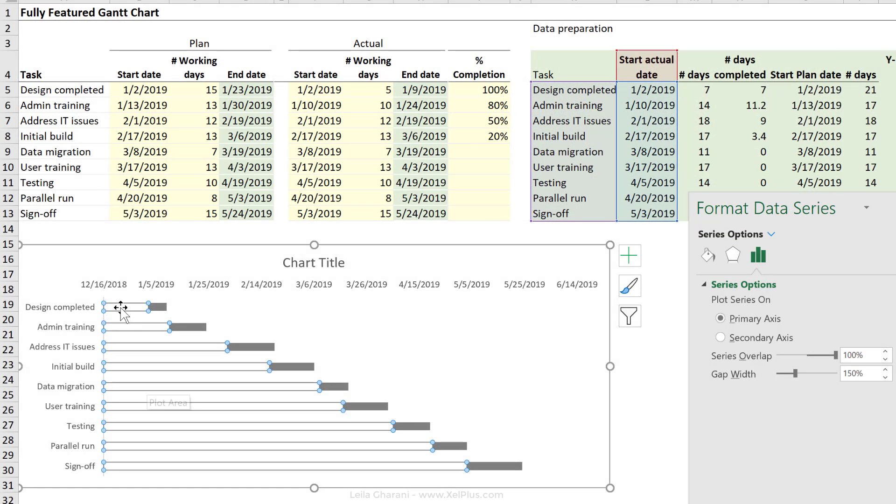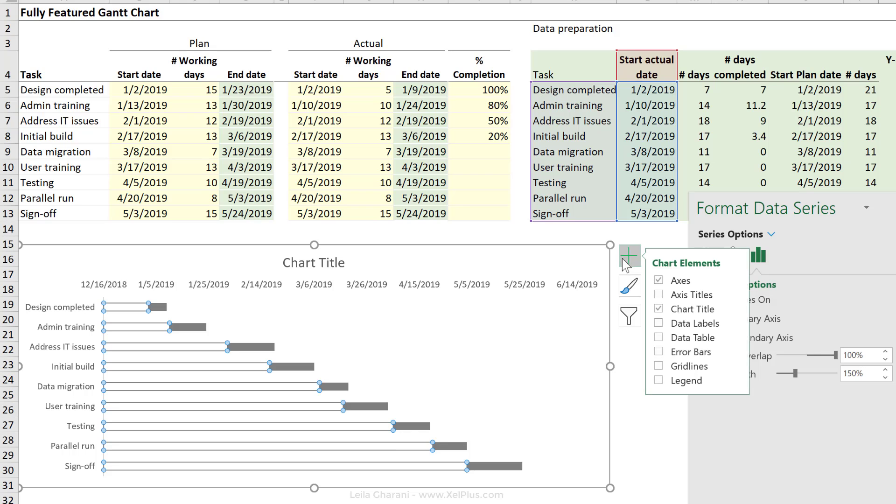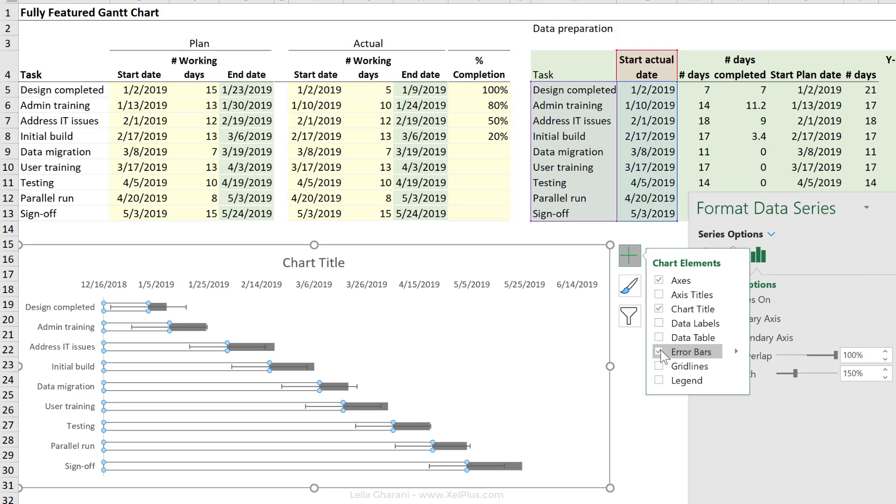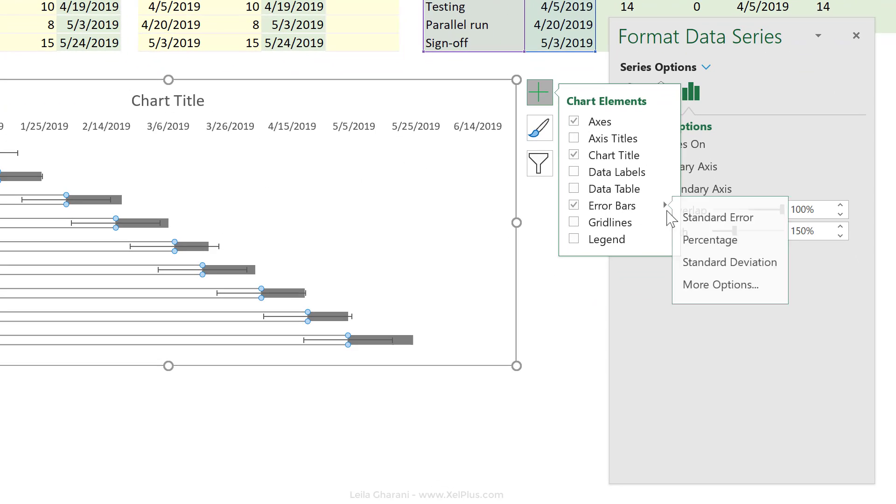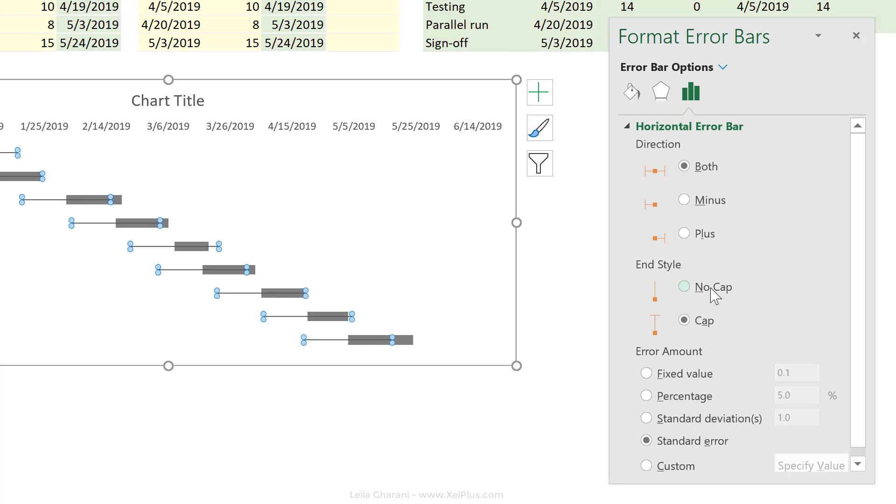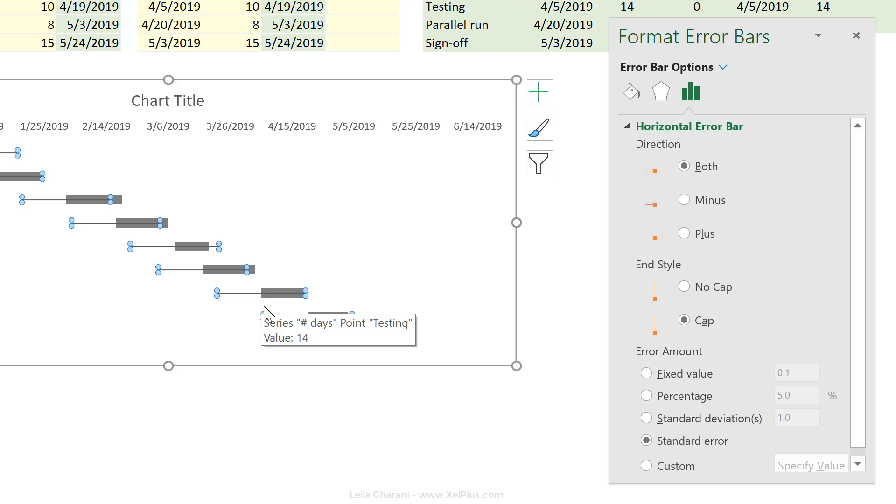To activate the error lines, highlight the invisible series first. Go to the plus and put a tick mark for error bars here. Now, let's go to more options and check out which one we're at. It's the horizontal error bars, and these are the ones we need. We need the plus side only.